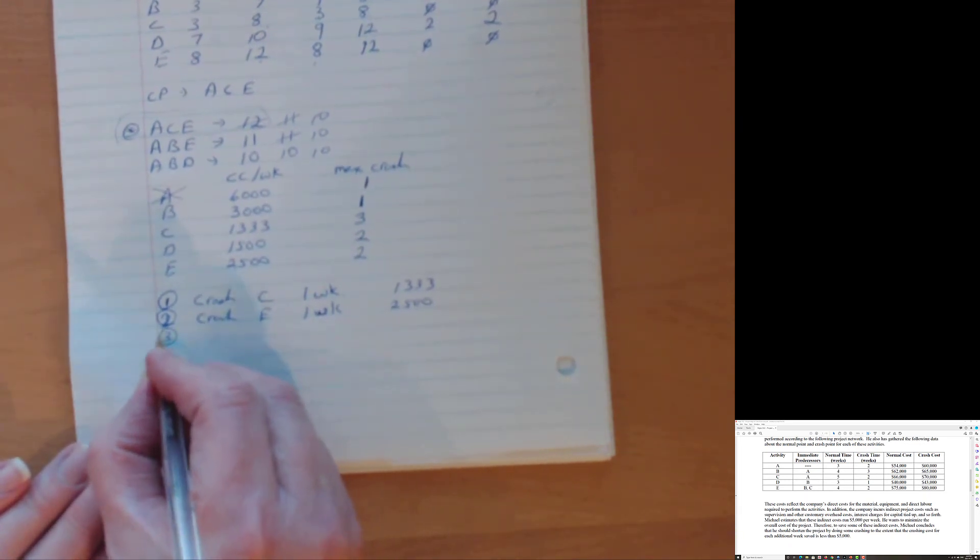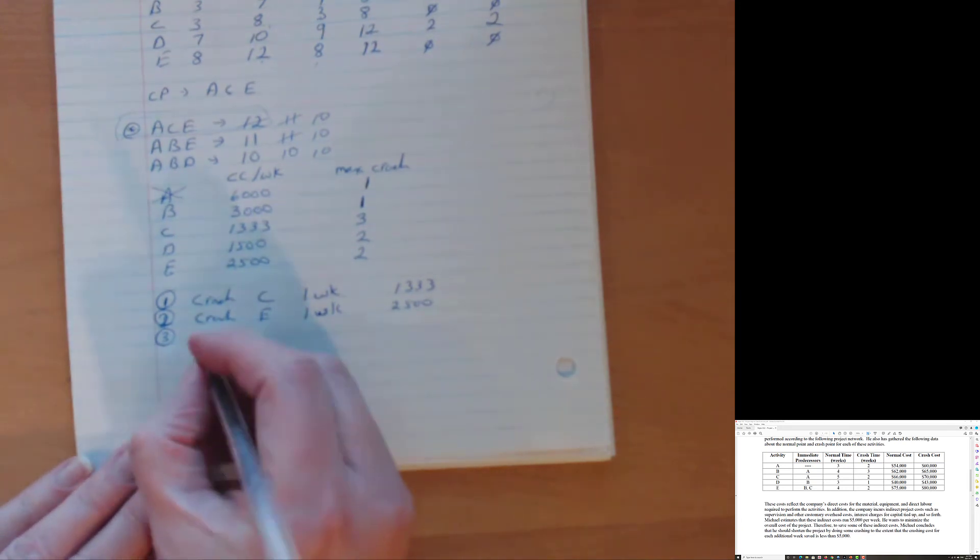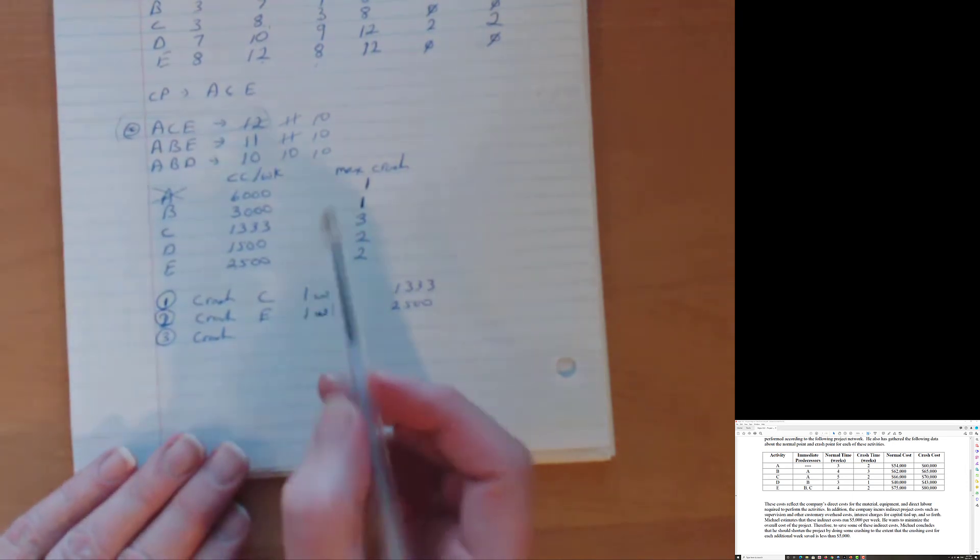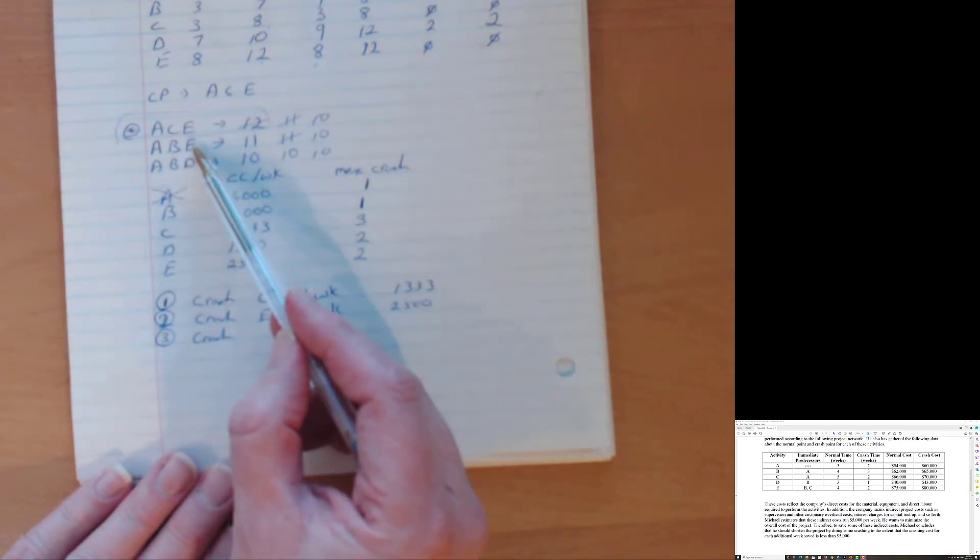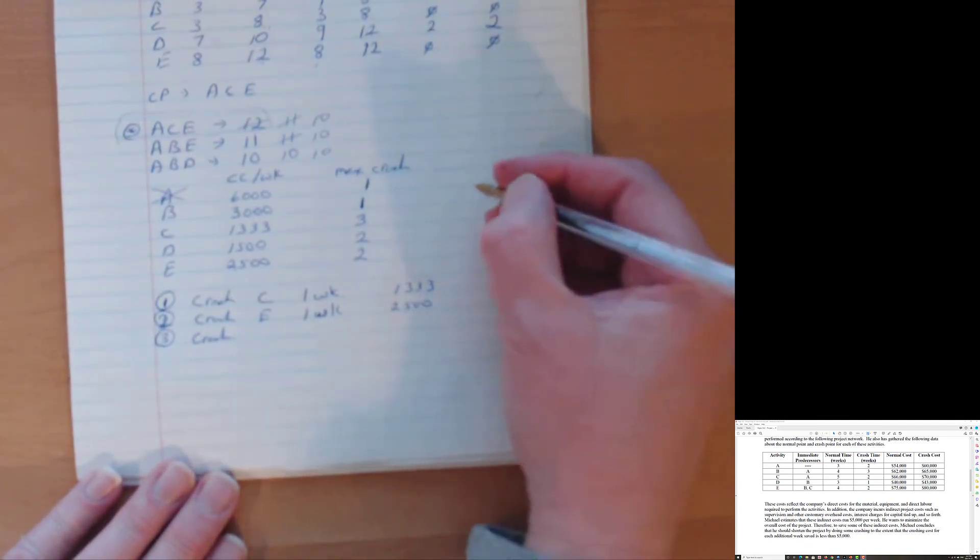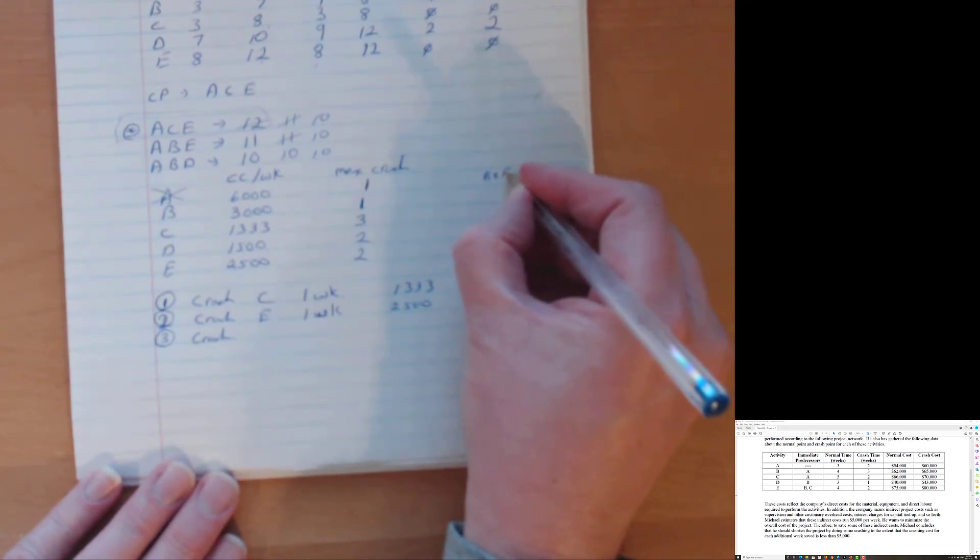But Alan, you say, there's no common activity to all three. It can't be done. What do I do? What do I do? Now we do the combo activity combos. So now we're going to have to crash two activities and we're going to have to pay to crash both of those activities. That kind of sucks. So now we're going to look at activities. So we can see B and E is a possibility. Let's just write them down. You'd write them down in a margin or a side so it's not so messy. But I could do a B and an E, let's say, as in break and enter. I can do a B and a C.